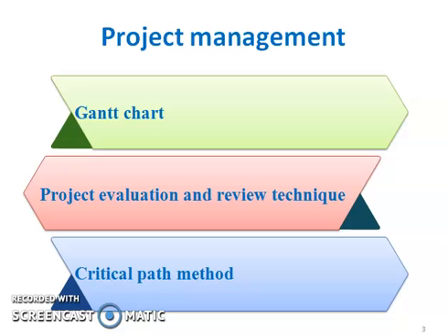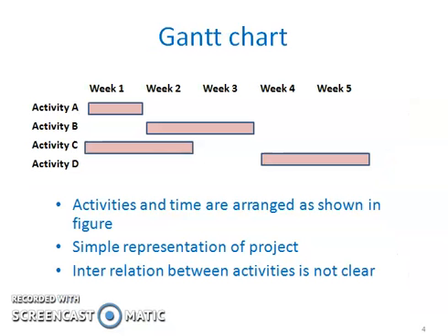See, these are some of the important tools: Gantt chart, project evaluation and review technique, critical path method. Firstly, I shall explain the Gantt chart. These are charts where on one axis activities are arranged and on the other, time taken for completing these activities is shown. You can calculate total time taken by the activities.